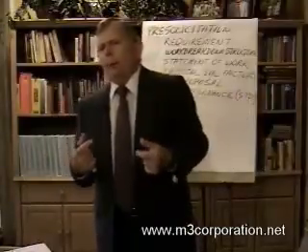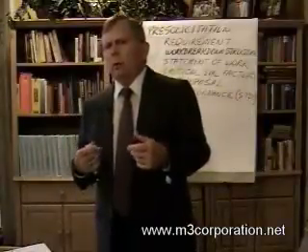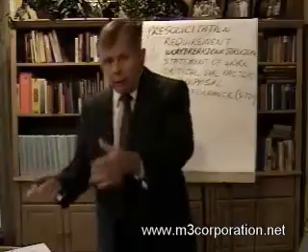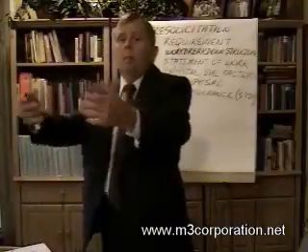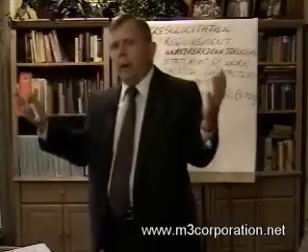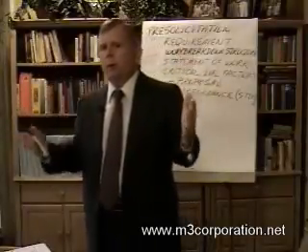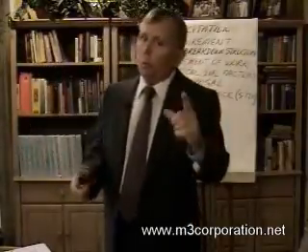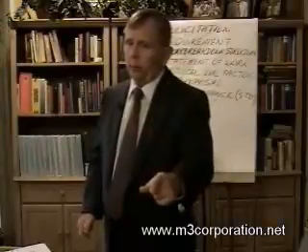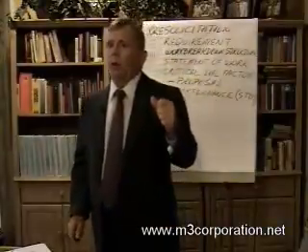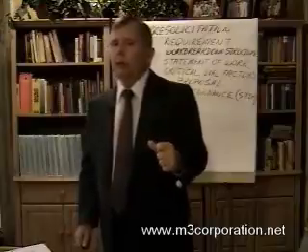And the tighter we place these standards, the more it's going to cost the government, because it costs the contractor more money in order to meet higher standards. What are the minimum standards that we can live with? Well, the user, the customer, is the one that is going to have to make the determination on what standard we can live with.